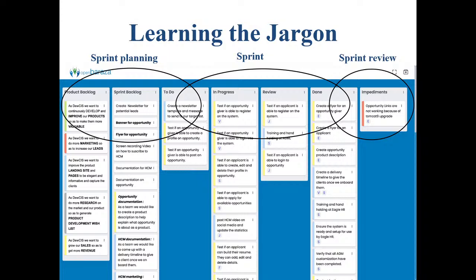So you'd have 3 clear events that would happen. There'd be the sprint planning, which is like a 2-hour meeting where you plan. There'd be the sprint, which would be like 2 weeks. Within the sprint, there's an event called a stand-up. Stand-up means a meeting held standing up, and you say what I did yesterday, what I am doing today, and what impediments I have, and these are things we'll continue to explain. That's why we have an introductory session, which is short, should be around half an hour.